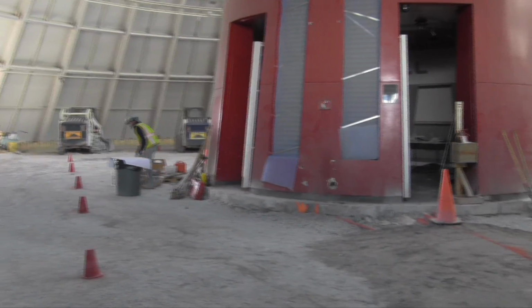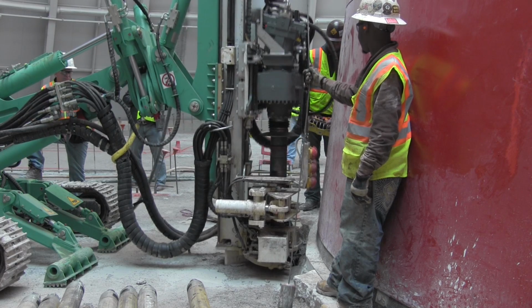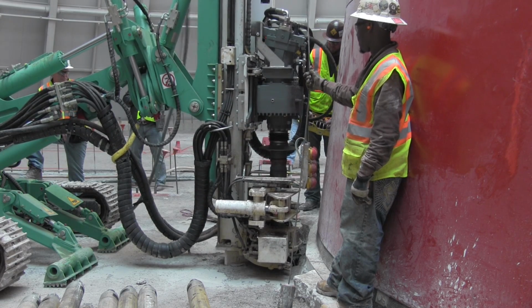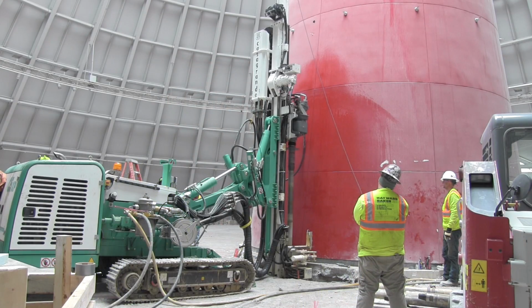Yesterday, on February 11th, Haywood Baker, the geotechnical drilling contractor that's installing the micropiles, started work. That was on schedule to the day when they were supposed to be here. They started drilling their first micropile, which is located on the spire. If you recall, the spire was basically hanging out over the edge of the sinkhole. We were able to install 5 micropiles originally on the spire, and we still had to get to that backside, but we never could until the sinkhole was backfilled. So when they resumed yesterday, our first step was to get some of the micropiles started on the backside of the spire.